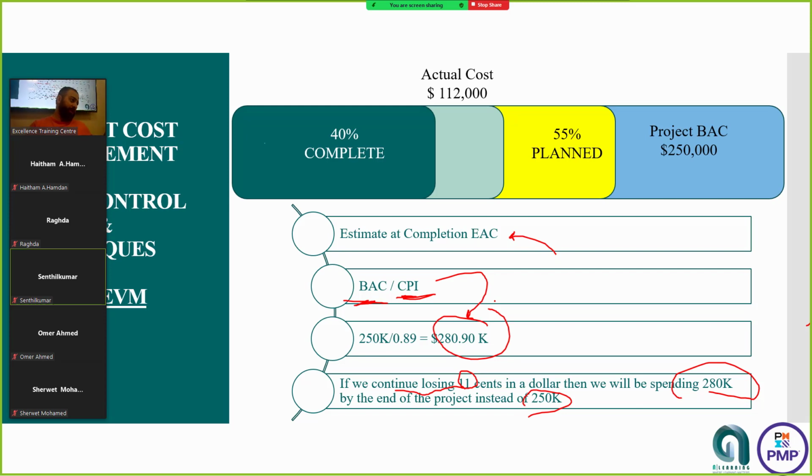If you think that there is no solution, let's say sometimes it's complicated, as a project manager, the client and the stakeholders need to agree all together. This is the maximum that we can do. What will happen? While spending 30k, due maybe to changes, we don't know. If there are changes, then the client needs to know that he will be paying an extra 30k. And if the client is refusing to pay, you will know as a company that you will be losing 30k. If your profit is more than 30k, fine; if your profit is less than 30k, you'll be paying the difference from your own pocket. So you see how beneficial those equations are.